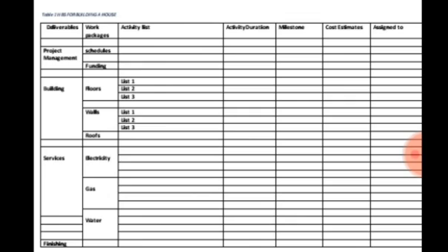You've done the pillar. Now you raise the blocks of the house. You understand? So how long is it going to take for you to raise the blocks of the house, probably to the roofing level? You state how long it's going to take in your activity duration. When is it going to start and when is it going to end? You state it there in your milestone. How much is it going to cost? You state it there. Who is going to be handling it? You equally state it there.